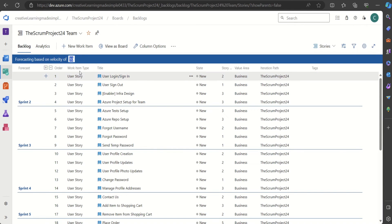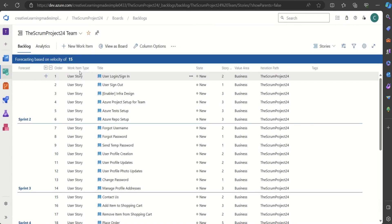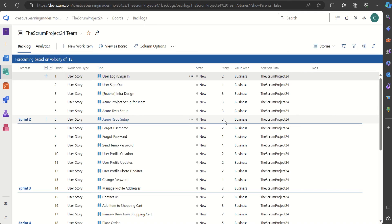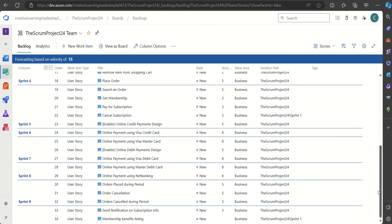Let's say our team's velocity is going to be 15 for a new team that is just planning. If I enter 15, these are the set of user stories that can be completed in Sprint 2: 2+1=3, 3+3=6, 6+3=9, 9+3=12, 12+3=15. And these are the stories that can be completed in Sprint 3. Now the total sprints it will take is around 10.